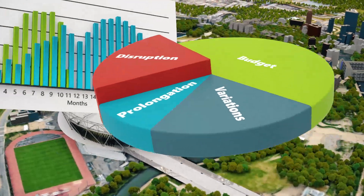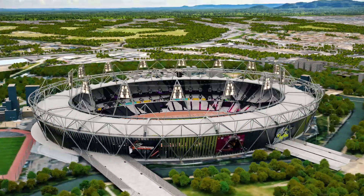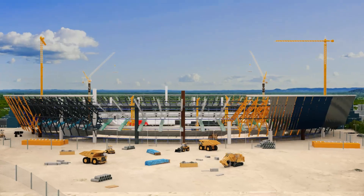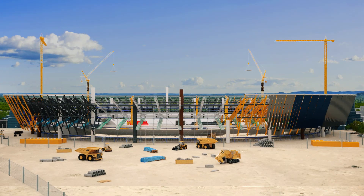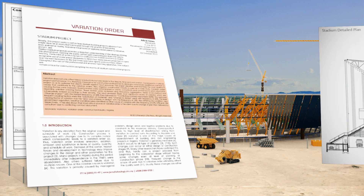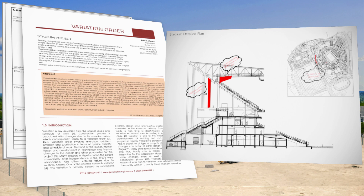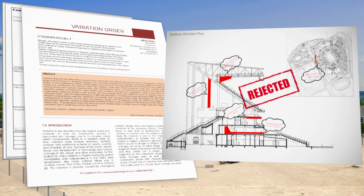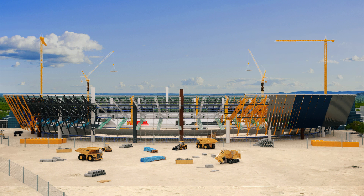Disruption comes from losses in efficiency, and during the course of your project, your efficiency was certainly affected by lots of changes, which happened everywhere and at all times. For example, you may claim that the employer introduced many variations. Many of these were made informally as mere comments on shop drawings, and at times, in order to minimise escalating delays, you even had to start construction before final drawings were available.